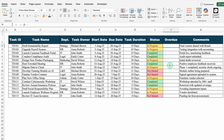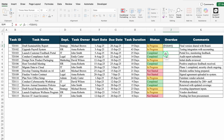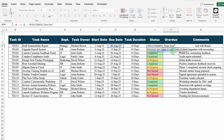Now let's come to Overdue. This will be formulated as well as dynamic. I will insert the formula part by part for better understanding. Equal to TODAY(), bracket open, bracket close, and hit enter. We got today's date. I will align this in center. Now I will double click on the formula, come to the very beginning, and insert the criteria of IF. If due date is smaller than today, in that case I want 'overdue' — so double inverted comma, overdue, double inverted comma close, comma. If this criteria is not met, I want blank — double inverted commas twice. We will close the bracket and hit enter.